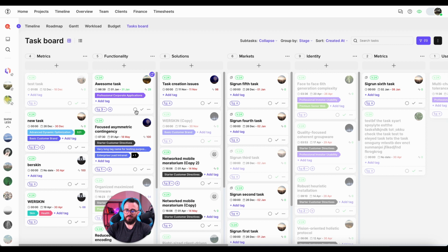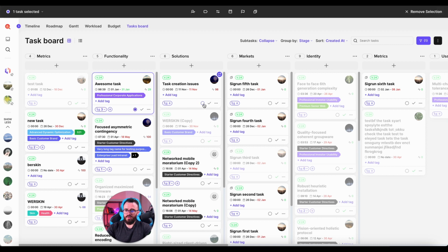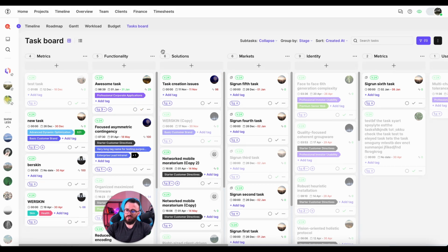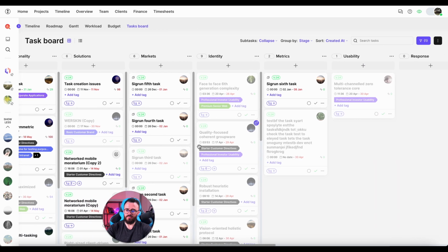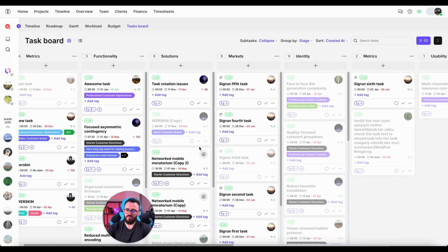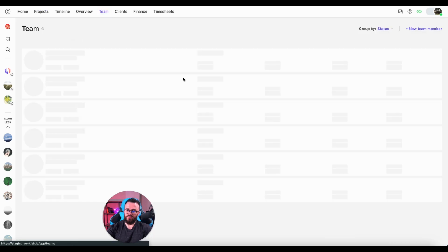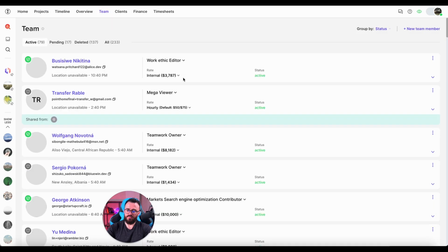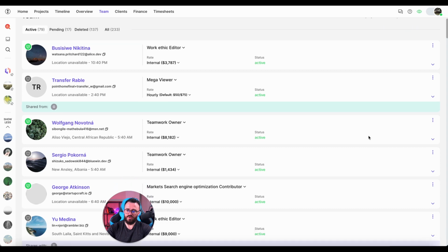There are some hidden secrets here and there while you're working, like you can move tasks between the milestones, which will impact the costs and calculation of the time there. You can change the different types of the milestones on the go if, for instance, someone accidentally made an error. And what's important, when the team is tracking the time, the rates you've set here retain the historical order.